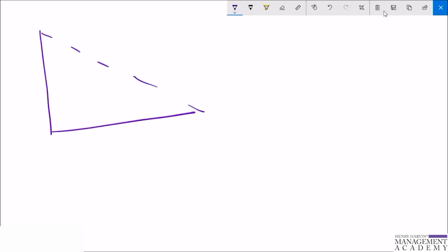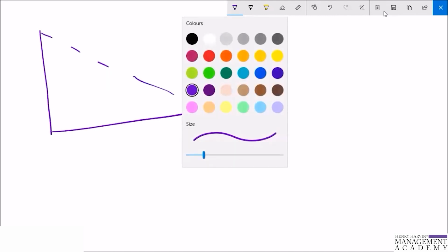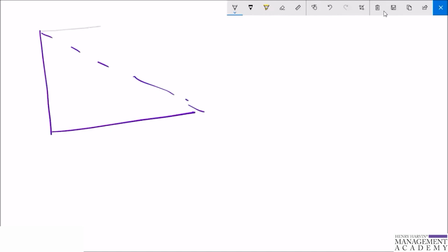Suppose this is another graph in which the graph is not showing anything to us. What does it mean? It means that the team has not estimated the story. During the sprint planning meeting, though there might be discussion between the product owner and the team, the team at the end of the meeting has not updated their hours on the task board, and that is the reason there is no line appearing.